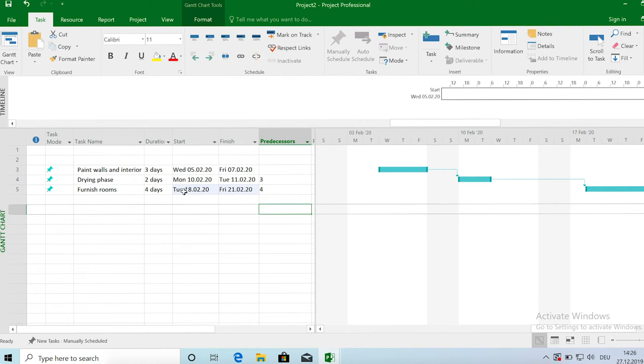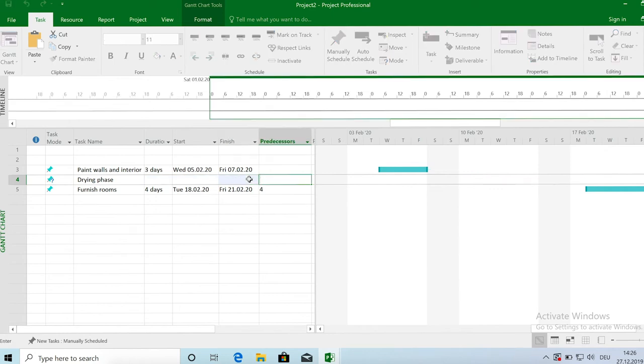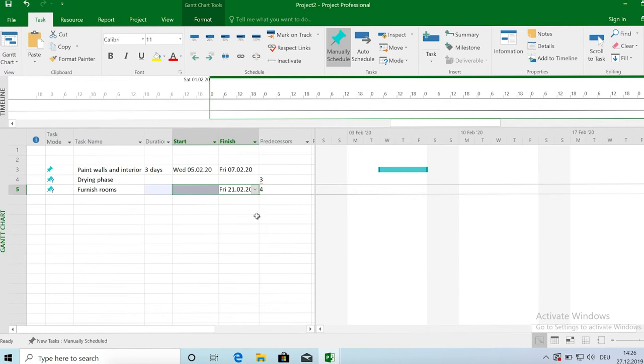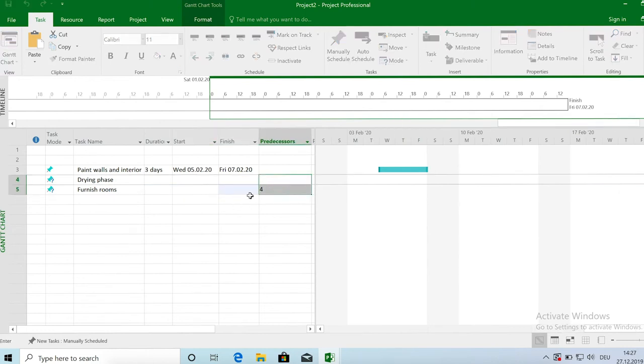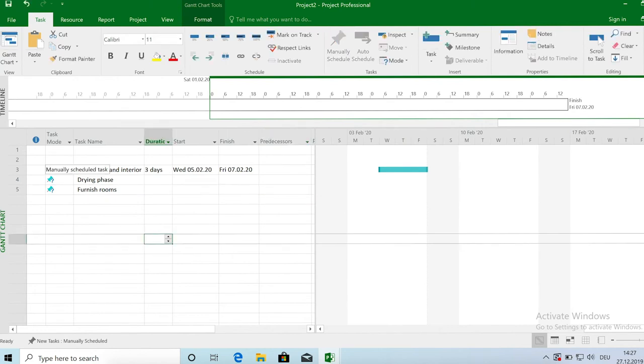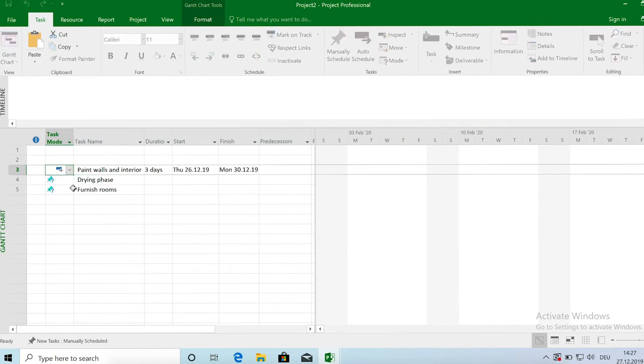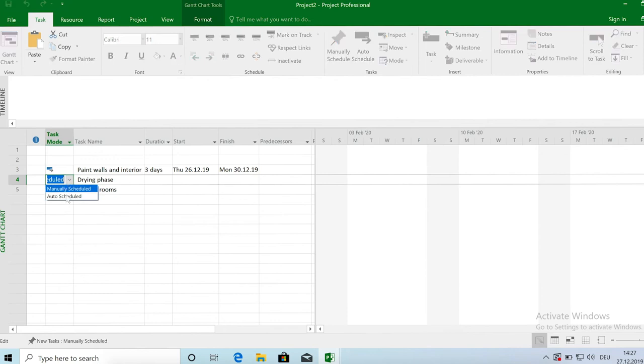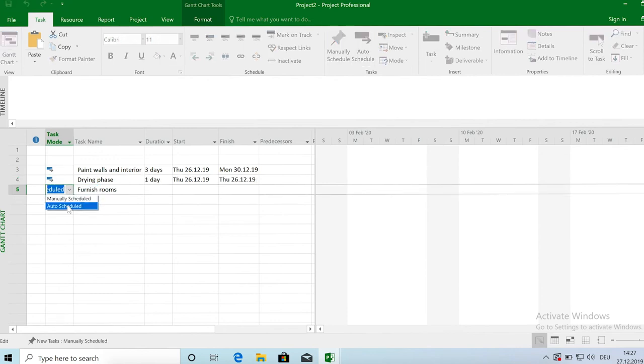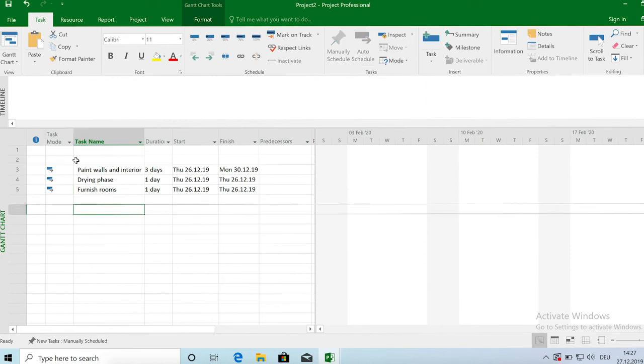So now let's take the test or let's go with the automatic approach. So let's just delete those entries here or we can have the dates entered. Now we can just remove that so we start at zero. So I can decide for each task whether it should be automatically or manually scheduled. So now let's put everything to automatic and what you have to do is you go to this column task mode and you set it to auto scheduled. There are ways to do this simultaneously for a number of tasks so that you don't have to do that one by one. But for the simple example with the three tasks this should be fine.